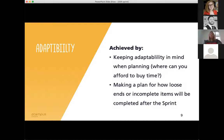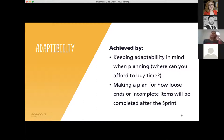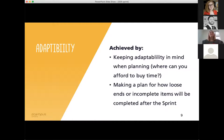Adaptability is key. Planning ahead of time to adapt as needed will allow sprint participants to stay productive and in high spirits. If there's really great work happening on something but you've gone over time, it would be worthwhile to let that keep happening rather than jumping ship and leaving a task incomplete. Be strategic from the onset by keeping adaptability in mind when planning. You can do that first by determining where you might be able to buy time when needed as you build the agenda, and second, by actually planning to have loose ends tied up after the sprint. If you plan from the beginning to have some work done afterwards, then adaptability during the sprint is much easier.